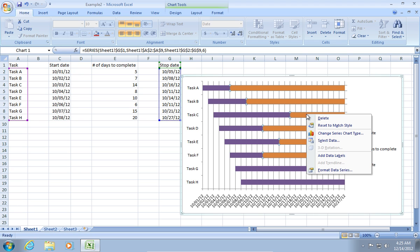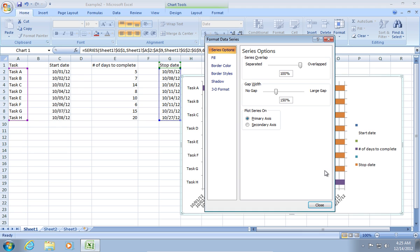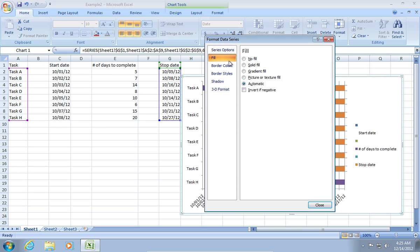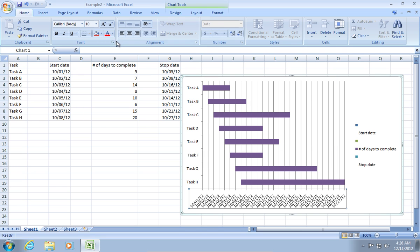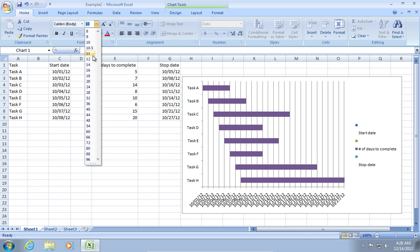Right-click on it and choose Format Data Series. In the opened window, go to the Fill tab and select No Fill. Then, go to the Border Color tab and set No Line. You can also adjust text size.